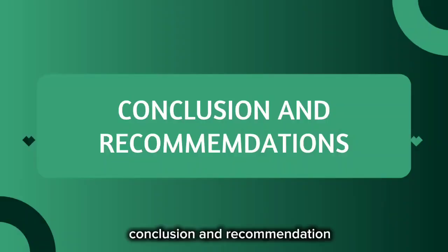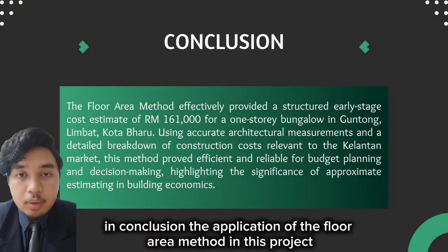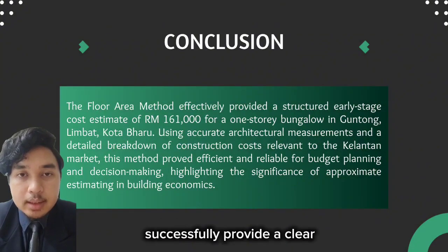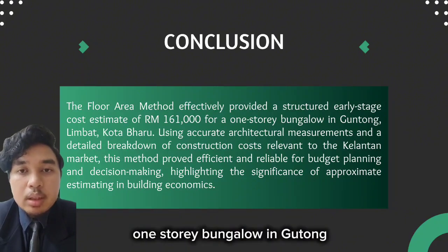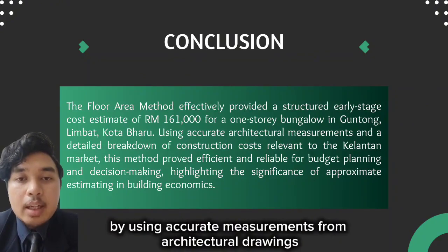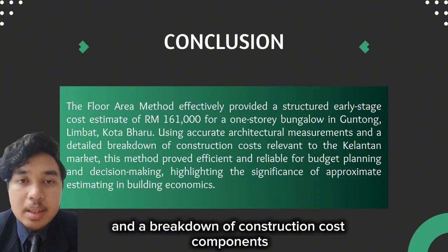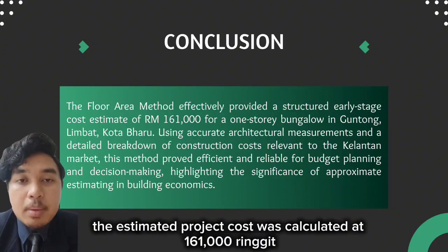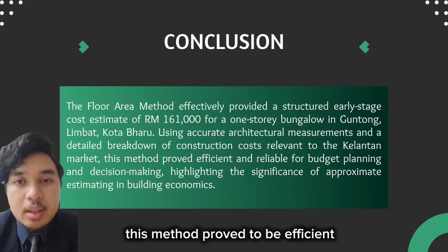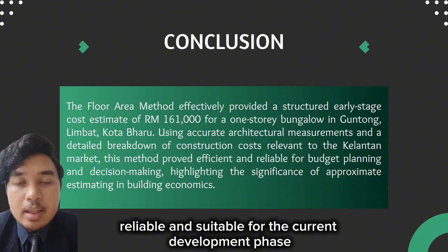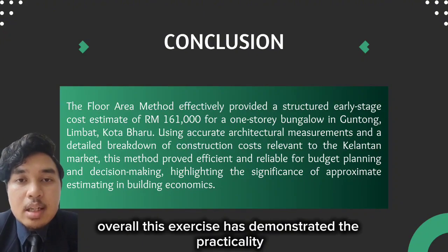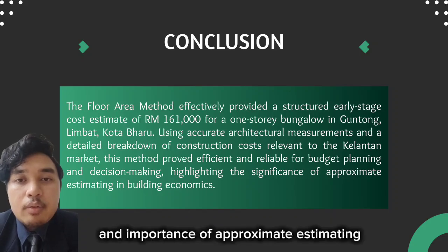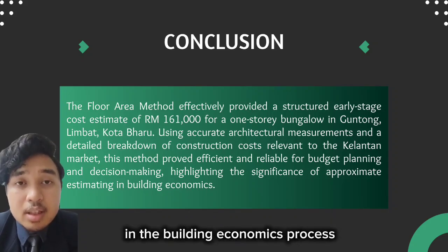Conclusion and recommendation. In conclusion, the application of the floor area method in this project successfully provided a clear, structured, and realistic early-stage cost estimate for the proposed one-story bungalow in Kutong, Limbat, Kota Baru. By using accurate measurements from architectural drawings and a breakdown of construction cost components tailored to Kelantan market conditions, the estimated project cost was calculated at 161,000 ringgit. This method proved to be efficient, reliable, and suitable for the current development phase, offering essential insight for budget planning and early decision-making. Overall, this exercise has demonstrated the practicality and importance of approximate estimating in the building economics process.